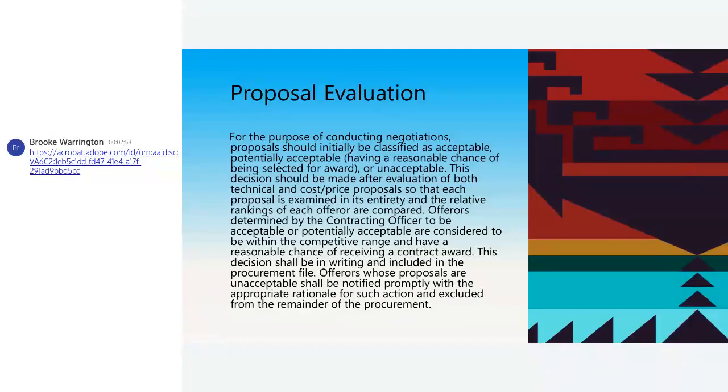Recommended business days, okay? We will notify you within 10 business days. That way, if that happens right in the middle between Christmas and New Year's, you're going to have time to do that, okay? Offerers whose proposals are unacceptable shall be notified promptly with the appropriate rationale for such action and excluded from the remainder of that procurement.